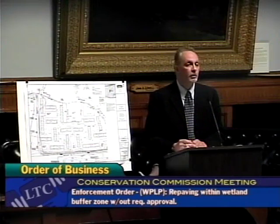So what will happen going forward is the EO will stay open until such time that we either approve a notice of intent in an order of conditions or we close out the project. Typically we close out the EO once we've approved an order of conditions. There's nothing else that we need to do at this point in time. We await the filing. Thank you. We appreciate your time and your comments, so that we can respond to this appropriately.